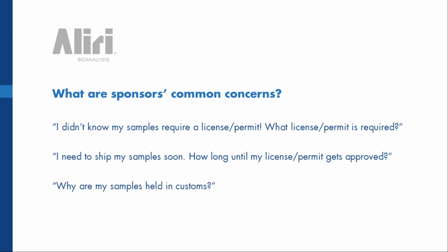The next common concern, and this is a worst case scenario, is why are my samples held in customs? So this has happened in the past. Sometimes sponsors become a little quick and they will send samples to our site before we've gotten a proposal in place, before we've gotten a protocol, thinking that they're trying to be helpful or proactive. And in doing so, they may unwittingly send samples to the United States without any permits or licenses that are required, and then they end up getting held up in customs at the U.S. border, thawing potentially, and in the worst case scenario, they can be rejected altogether.